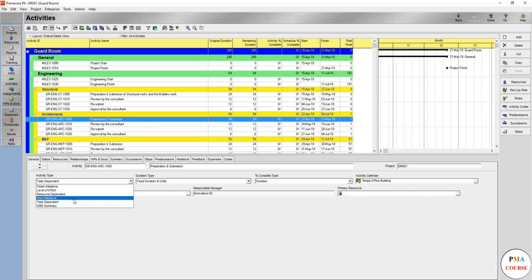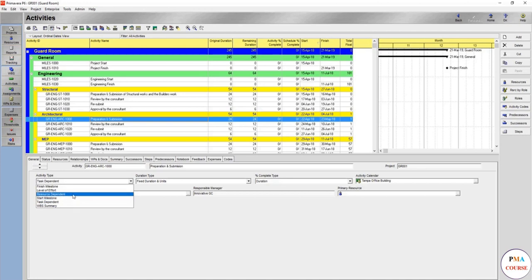The resource dependent is the type of activity used for an activity which has limited resources. In this case you will assign the resource and give it days and everything, and the resource will drive the activity duration, not like the task dependent.